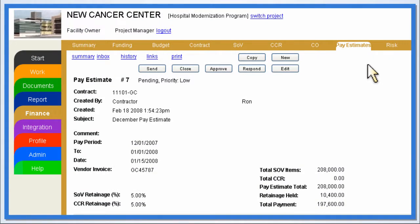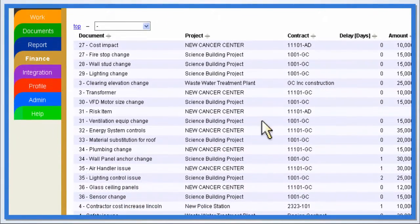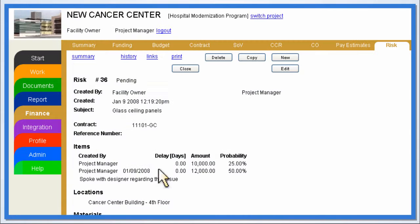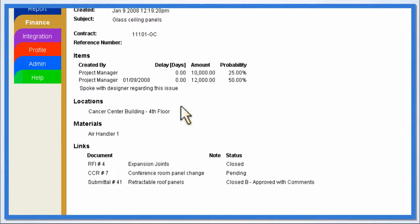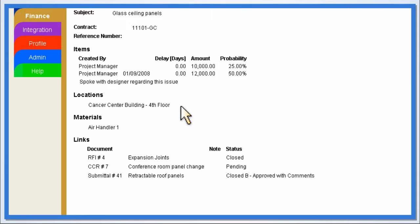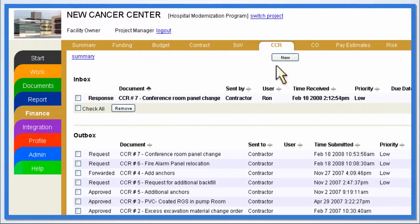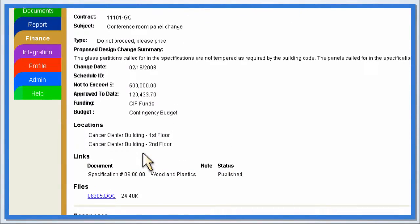Users can complete risk assessment and mitigation by reviewing the project's outstanding risks on the Risk Summary page. Selecting a risk item displays the issue details, including potential costs, delays, and related documents. Based on the risk assessment, construction managers can develop contract change requests, soliciting price proposals from contractors.